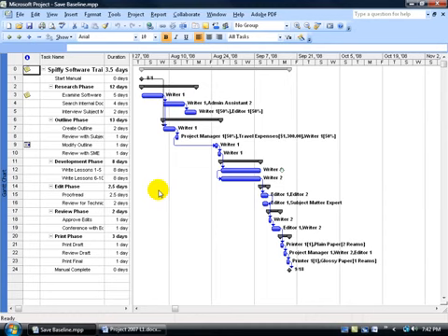To save a baseline, again, before you begin your project, which is really late now, because if I save a baseline now, it's going to take a snapshot of whatever it is I have now. So again, the emphasis is to save a baseline before you begin your project, so you have your originals, and then as things change throughout the project, you can always compare that against the original or that snapshot.